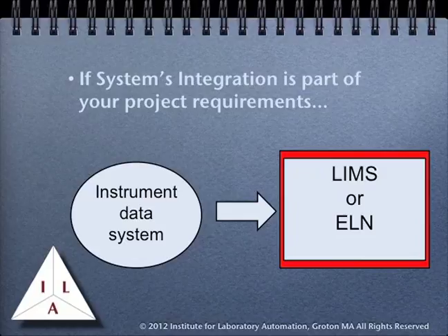If those instruments are not the same as the ones you have in your laboratory, for example, the notebook supports a balance from one vendor and you have another vendor's products, it may be a lot cheaper and a lot easier to change balances than go through the problems of programming and validating a new device. The time of purchase is a point at which you want to seriously address these things with a vendor. They may be interested enough in the sale to make concessions or work with you on integration projects.